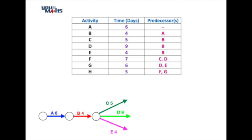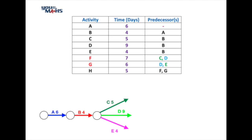The next thing to consider is we have a possible conflict with our predecessors for task F and G. F has got predecessors of C and D, and G's got predecessors of D and E, so there's a little bit of a mix going on.